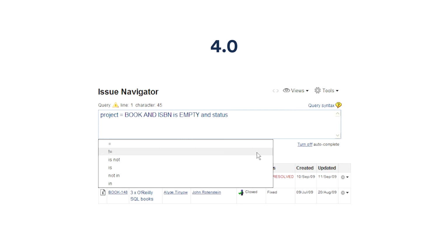So linking would be more the path than cloning the issue or moving the issue from one project to the other? Correct. I usually want to keep that other issue where it was reported, unless it's totally unrelated to that team. But if that team needs it to be successful, then they need to be tracking it as well. So if you move it, you'll lose that reference in the other project, right? Correct. Thank you. No problem.